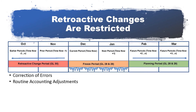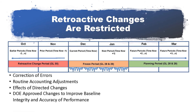Any routine accounting adjustments to ACWP, including retroactive rate adjustments, and DOE-directed or approved changes, may require an adjustment to previously reported BCWS, BCWP, or ACWP. These types of changes are rare, but occasionally, in order to accommodate the negotiation of authorized scope, it may be required to make a budget adjustment in prior months. In addition, if a DOE decision is made regarding the allowability of historical costs, the ACWP will be adjusted accordingly. Any changes required to improve baseline integrity and accuracy of the performance measurement data should be exceptionally rare and require prior DOE approval.